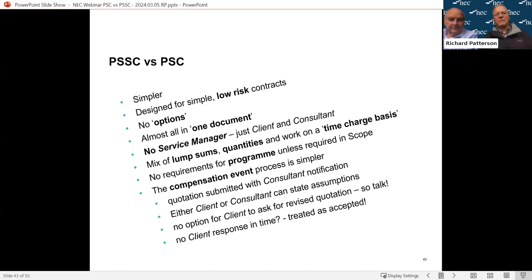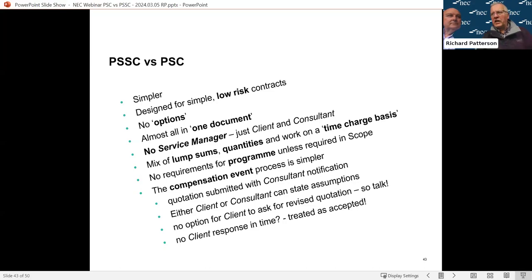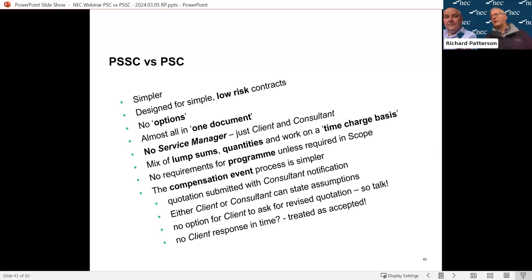A question came in: is there a potential conflict with the 25% retention being held if the client does not formally instruct program updates - i.e. would an omission be a risk? The answer is that the 25% retention only applies to the first program, in both the standard PSC and the short contract. It's NEC's mechanism for commercially incentivising the consultant to get a program in place. Some clients do add Z clauses making that retention apply to programs throughout the contract, but that's not standard.